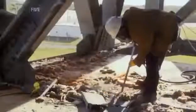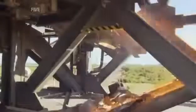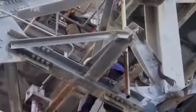With the steel cuts nearing completion, the team now have to remove another part of the tower, the floors. If they were left in place, during demolition, the floors could trap falling beams and hold the structure up. So the team needs to cut the floors out from beneath their feet, leaving them with little access to stairwells and only the narrow remaining girders to move around on. The floors also served another purpose, helping to stabilize the launch tower from high winds. Once they're gone, the team will have to work around the weather or risk being blown from the tower.